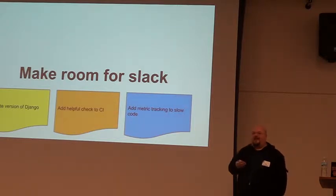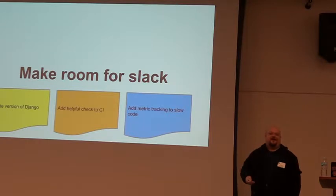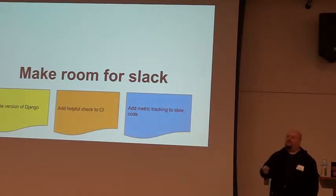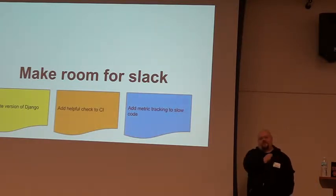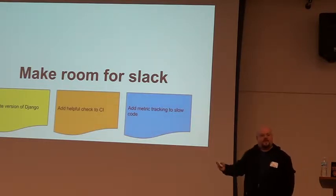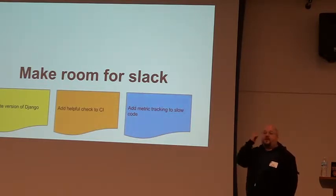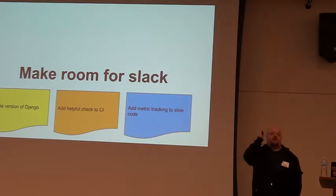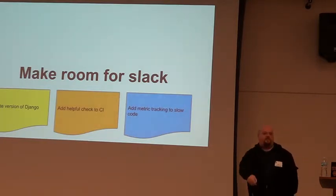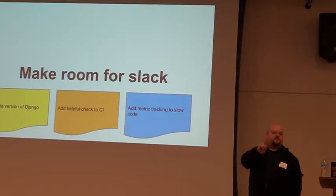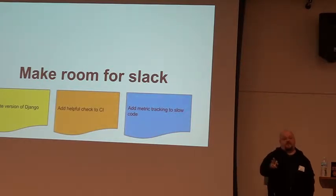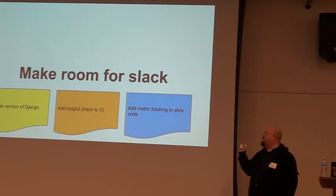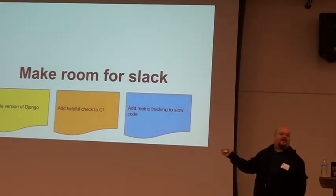One of the nice things if you limit the work in progress numbers of these lanes is you actually free up developers. If a developer is stuck, then he can go grab something from the slack lane which has various tasks to do. And what's great is devs all have these. They all want to get them done. All these slack items tend to actually make development better and smoother going forward. If you improve the testing infrastructure, everyone benefits. But it's not a direct bottom line thing. So no one ever says, hey, you can actually just take this week and work on testing infrastructure. And so what's nice is when you have these work in progress limitations, you have a very predictable amount of work you can get done in a period of time. So as a manager, you can very easily say, this feature is ten cards. We move five cards a week. This feature will take two weeks to do. And if we have extra time within that two weeks, developers can work on making great helpful improvements from the slack task setup.